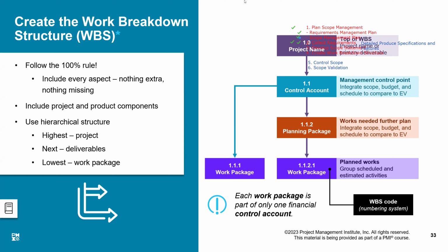So within our own project, we can always say that until the job is complete, it is not considered complete. That's it. 100% true. Only for contractors, maybe, the contractor demands a mobilization advance before we start this work. So give us 50% advance. How do you justify giving that money when the job is not done, not even started? So you say that from the moment the job is started, it is considered 50% complete because we have paid them 50%. And the final payment will only be released when the 100% completion is achieved.